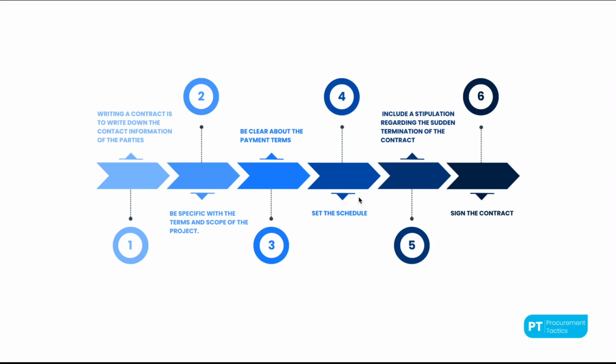Including a schedule in the contract is a way to ensure that everyone is on the same page regarding the project timeline and milestones. It creates transparency and accountability and promotes open communication throughout the renovation processes. With a well-defined schedule, payments can be linked to the completion of specific milestones, giving you peace of mind that a project is progressing smoothly. By working together based on this schedule, we can achieve a successful and timely renovation of your office space.